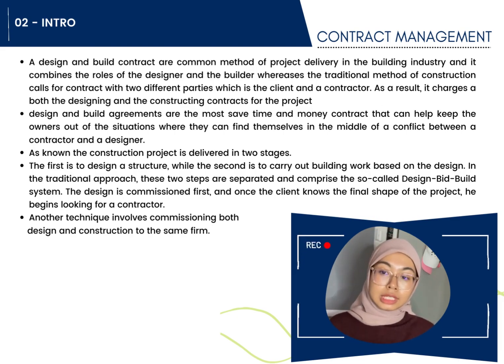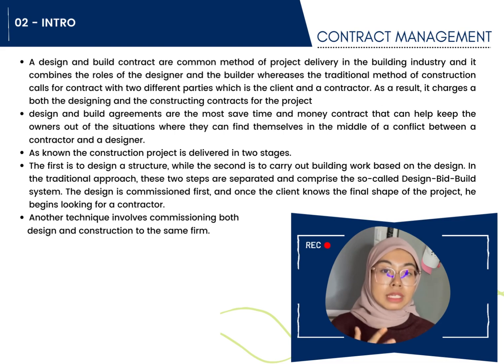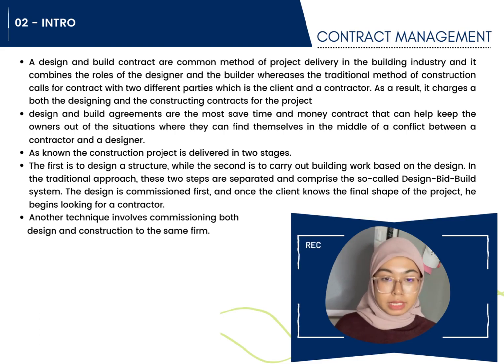Nevertheless, the design and build agreement is the contract that saves the most time and money, and can help keep the owner out of the situation where they find themselves in the middle of a conflict between a contractor and designer. With this type of agreement, the client and the contractor collaborate on the project as a team right from the start. Thus, some of the advantages that the owner can enjoy from the design and build contract include unified project recommendation, collaborative problem solving, one point of responsibility, and also savings in time and money.